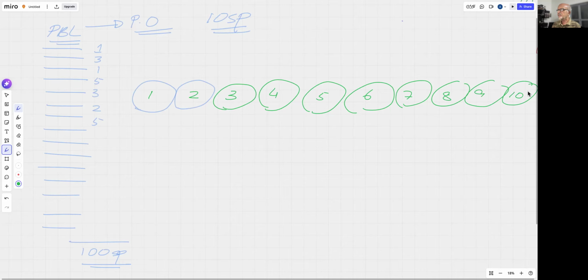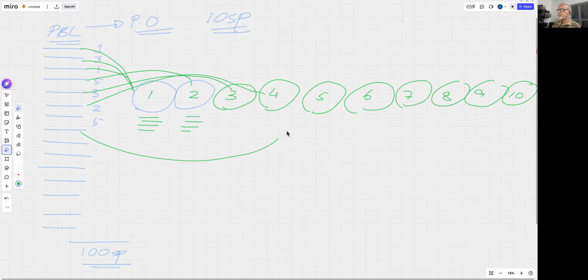In 10 iterations, we must be able to complete the whole thing, and each will have features worth 10 story points. From this, we distribute the features into sprints, and by and large we ensure that every sprint is loaded with an average of 10 story points.